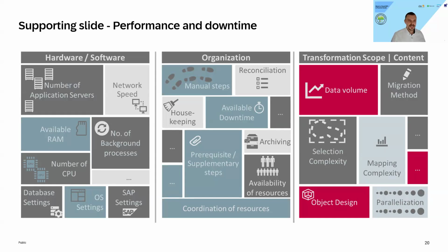Maybe you can share with us some project experience. Absolutely. From my own experience right now, 7 out of the top 10 projects that we do as a provider are actually NZDT-driven projects, because the downtime requirements are within hours or at least below a weekend downtime. And these requirements typically come with the large systems that we are seeing nowadays. We easily see many systems above 40, 50, 60 terabytes, and even above 100 terabytes is possible, which I have seen personally, and which of course brings in the NZDT technology.